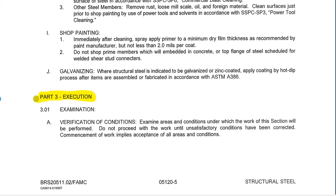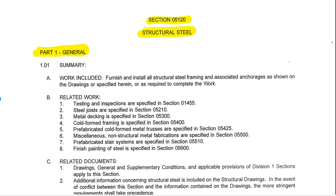So let's jump back up to the general and step through this section by section. At the top here we have a summary of the work included. What's interesting to see here is the word 'furnish and install.' This means that this scope of work includes producing the steel and fabricating the steel — so the furnishing would be fabricating — and then installing, which in steel means erecting steel. So we've got fabrication and erection of steel.